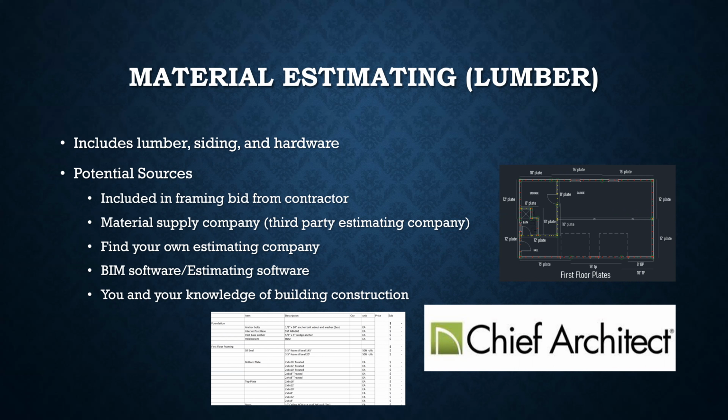Well, if you want to build a house and you need a material estimate for this lumber package, one of the things you could do is go to a contractor who's a framer and ask them for a bid on your plans, and there may or may not be structural plans to define the wood. Either way, you can request from that framer, assuming he will do it, to manage the materials. So he's going to be responsible for procurement of the materials. He's going to be responsible for counting it, and he's going to include that all in his bid price.